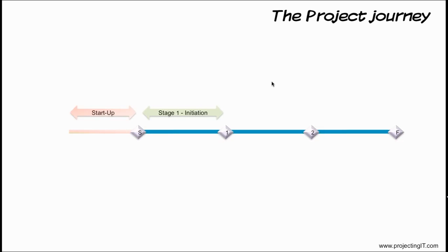During the initiation stage, the project manager will identify why and how this project work can be done. That is, explore the details of reasons, solutions, resources, costing, timescales, and how the project reporting and communication will take place. As part of initiation, detailed plans are produced and presented to the project board.